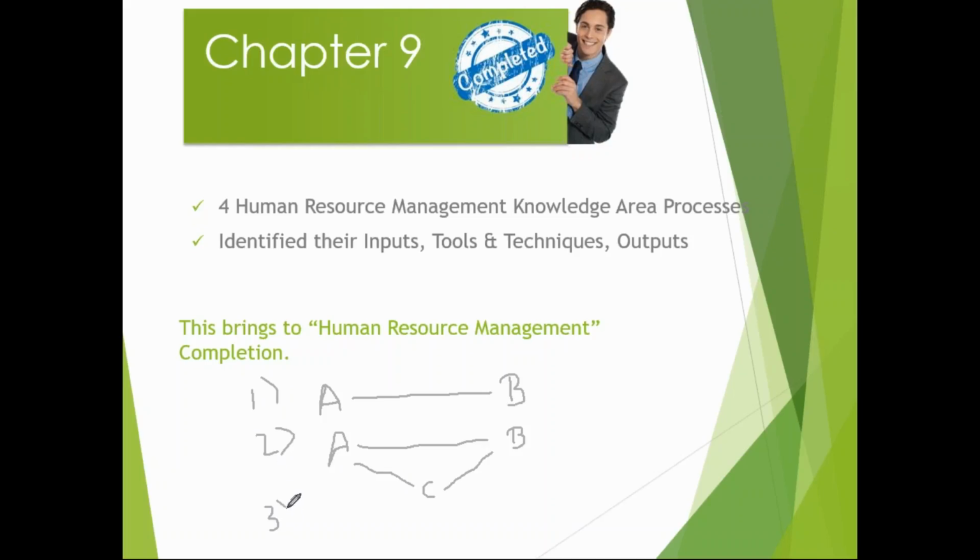So this is the first situation, this is the second situation. Let's increase the number of people involved in communication. So we have A, B, and then we have C and D. So 4 people are there. How many communications can now happen? A can talk to B, right? B can talk to D, C can talk to D, A can talk to C, and at the same point of time, A can also talk to D, and C can talk to B, right? So how many communications are here? 1, 2, 3, 4, 5, and 6.